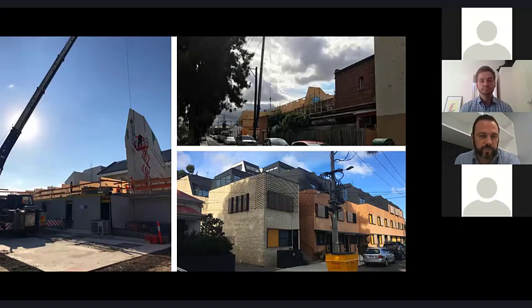So what you can see on the left-hand side is where the crane is lifting CLT panels in, and the structure actually continues after we erect most of the CLT there. You then have to come back, do part of the concrete structure, and then erect the smaller components that we can do from the street with closures. So it was a very difficult logistics project, but we were able to do it, but it did affect the design and some of the detailing that Nathan had to work on from a timber and concrete perspective.